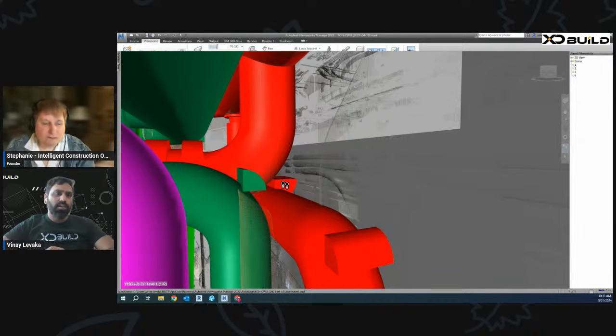Sure. Coming to the project owner, once we have the entire system in place in the model, with where the shutdowns are going to happen, there is less disruption to the services. Keep in mind that these are existing buildings with existing people, patients, and services. When there is less disruption, that's what the owner wants. On the cost side, there is an extreme benefit in doing the welding offsite rather than onsite. When we weld onsite, labor productivity is much lower compared to offsite welding, because of the ergonomic conditions in the shop compared to the not-so-ergonomic and not-so-safe positions on site.